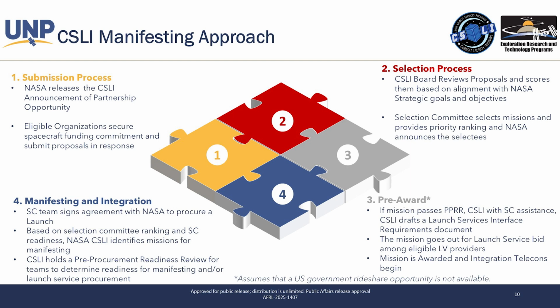All right, so now if you pass the PPRR, the pre-preparedness readiness review, we then work with you to draft what we call a launch services interface requirements document. Once that document captures all your requirements, all of the missions of your spacecraft, we then go out to a launch service bid among all the eligible launch service providers. The mission is awarded, everyone's happy, integration telecoms begin.